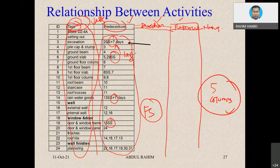The purpose of developing WBS is so that when we come up with the task list we do not miss out important tasks. In many construction projects some things are missing from the schedule — even very common items like windows, doors, balconies, openings in the floor, and staircases are sometimes missing because people forget to include them in the scheduling.